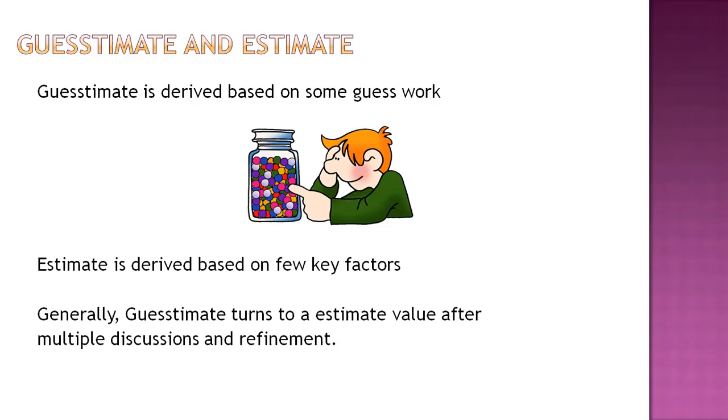Now what will we do? We have some more budget available. Why can't we pull some more people into the team? That means with the help of money, I am increasing the people count in my team so that the scope I have planned, the three requirements, I can achieve in 3 months instead of 6 months. This is how we need to balance between these three constraints. That's why these three are called the constraints of project management.